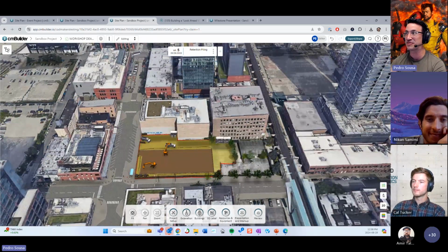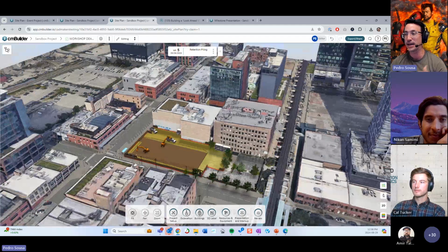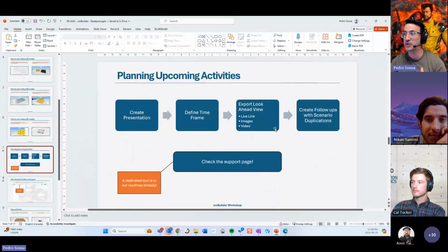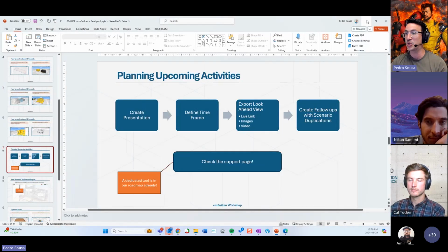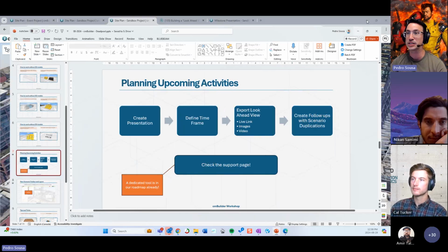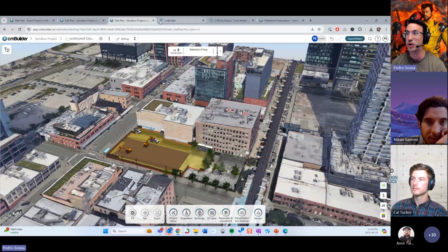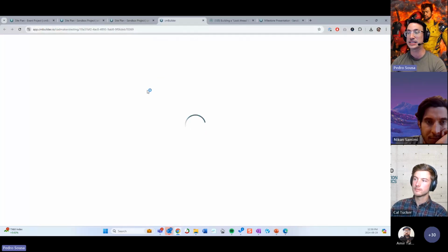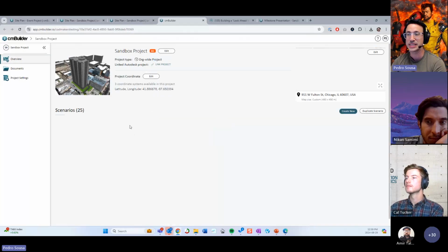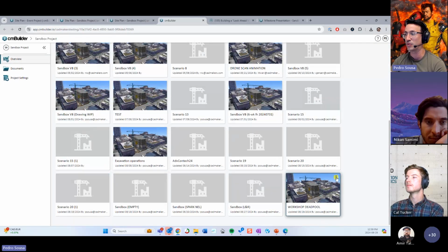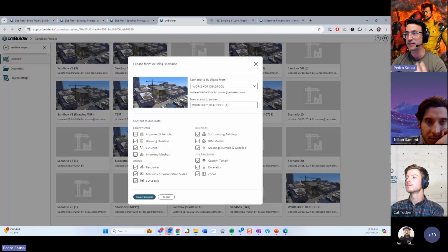So this is it for the video exports. But what happens if you now want to create a follow-up, right? So you created your 4-week look ahead, and now you have a new schedule because things changed and whatnot. So the best way for you to create a follow-up is to go into your project page, and instead of changing that animation itself, I always suggest that you duplicate that scenario,